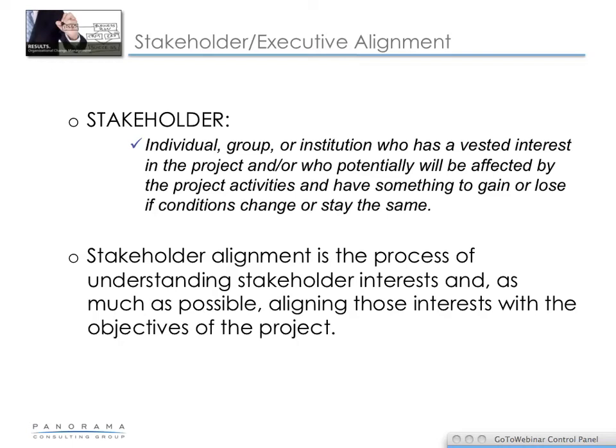We gather some very basic data on each stakeholder, but we actually do some analysis on the stakeholder to try to understand the magnitude of the impact of this project on that stakeholder, the level of influence the stakeholder may have on the project, and there's a number of other things on the stakeholder analysis, but it's very, very valuable to understand exactly who our stakeholders are and where each of them stands within the project.